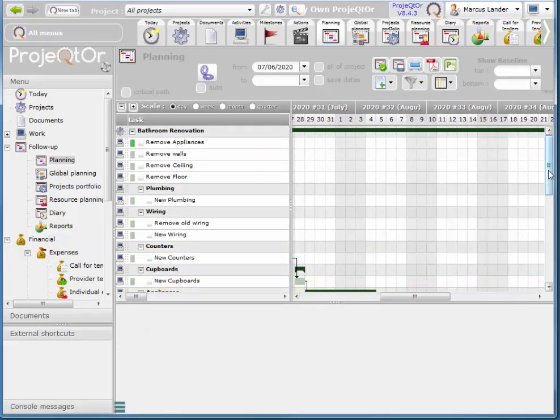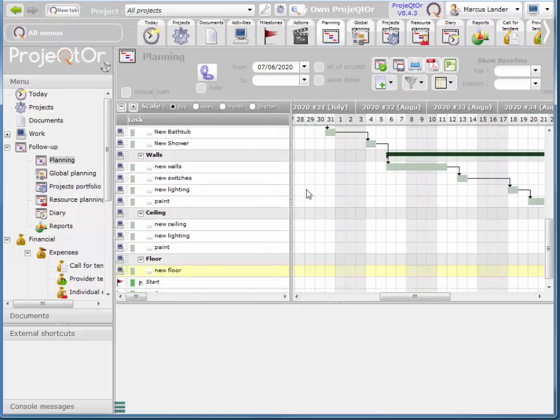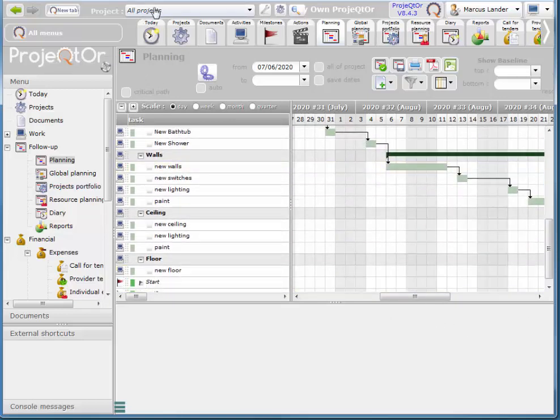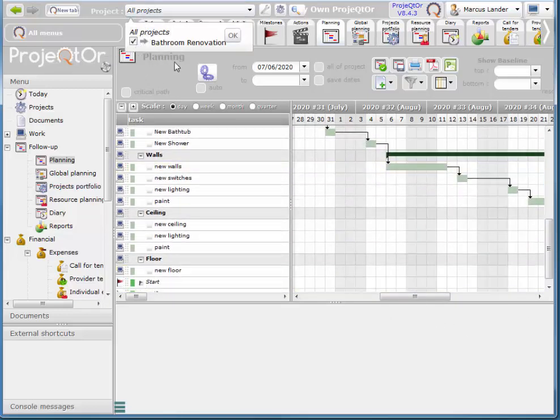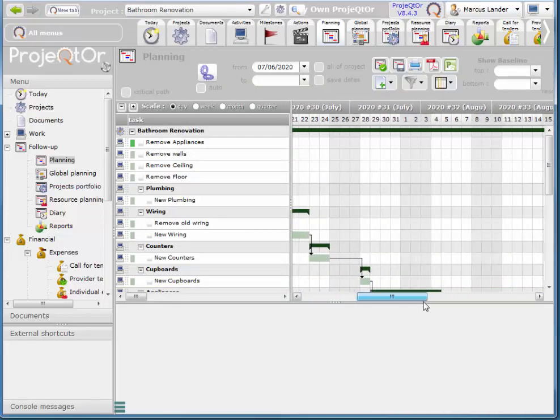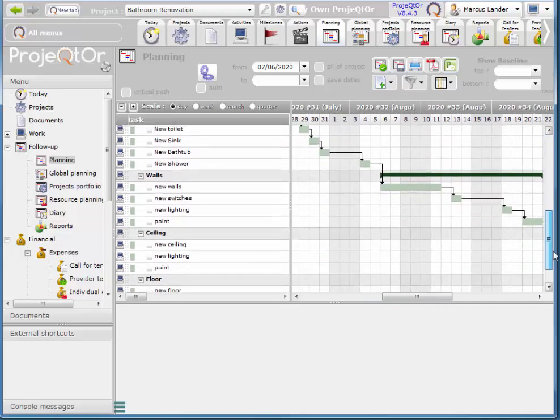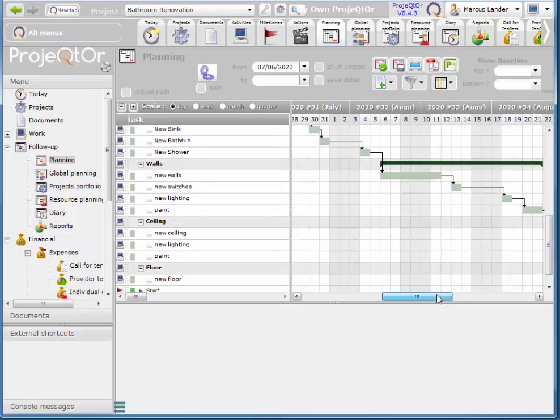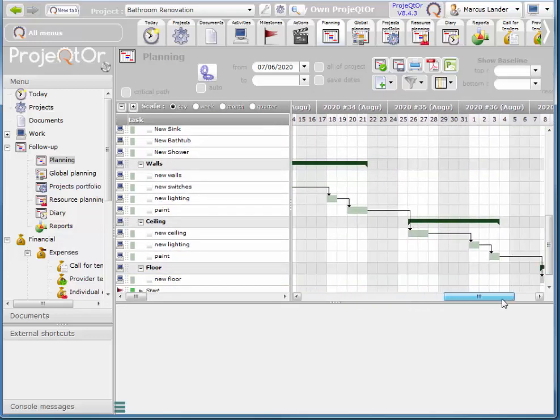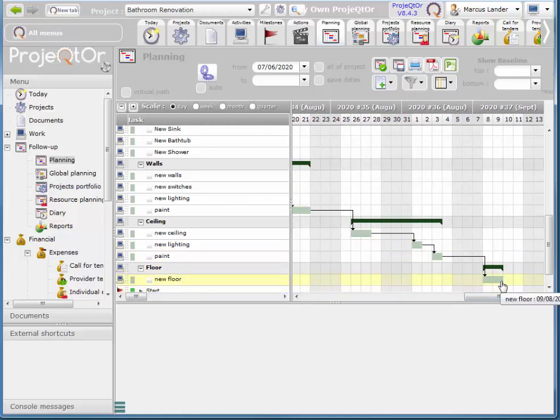In my situation I'm looking at, by the way, my bathroom renovation, and I can see by the Gantt chart once all the tasks are linked up that my project will finish on the 9th of September.